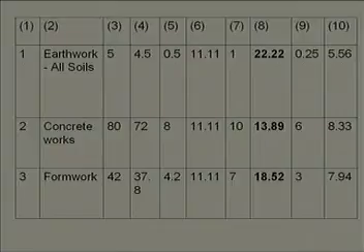So this is what is called front loading. Front loading means a situation in which I am keeping a very high margin for those activities or items which I am taking up at the beginning of the project.